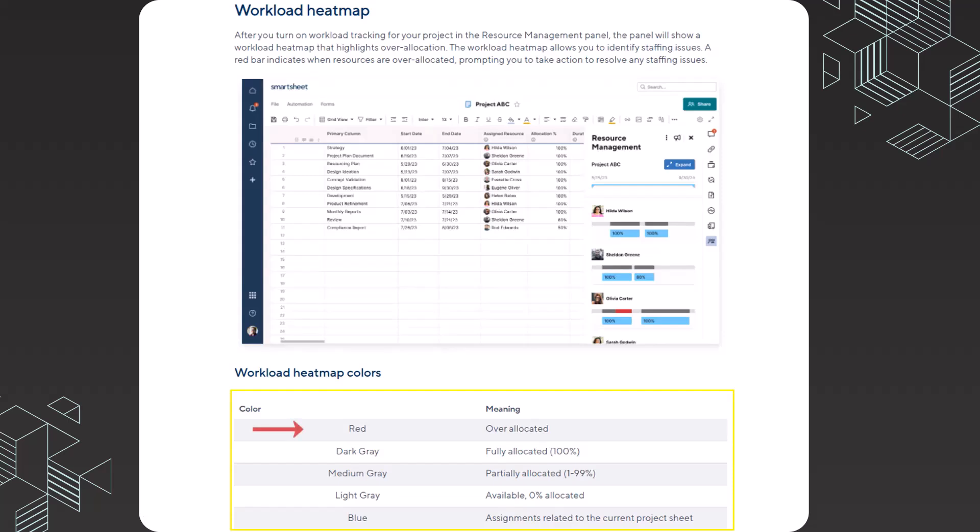Red means that an individual resource is over allocated. Dark gray means that someone is fully allocated, so 100%. Medium gray means that someone is partially allocated between 1% and 99%. Light gray means that the resource is available or 0% allocated.